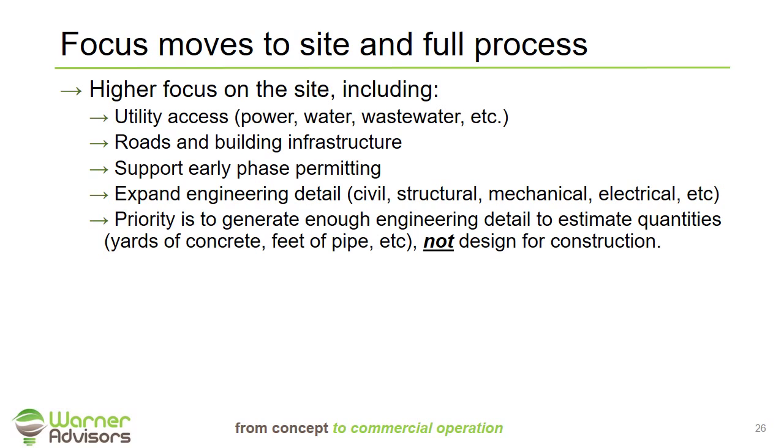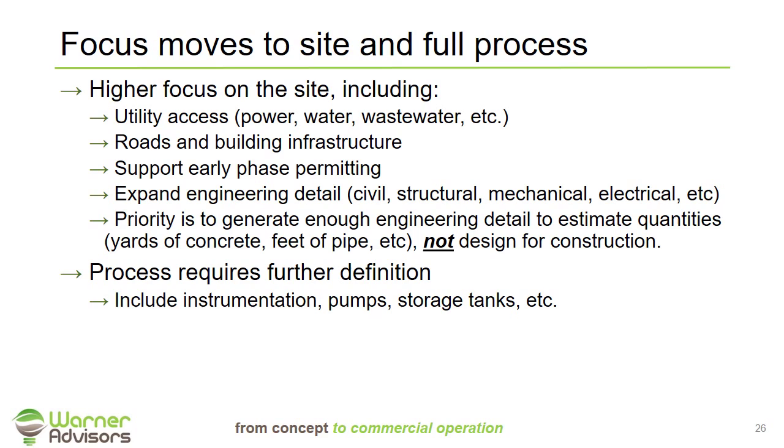The drawings generated will not be able to be used for construction, and there will be a much more detailed phase of engineering that comes in the next scope of the project. Now, we're also going to have to look at the process and get a little better definition. This includes things like instrumentation, pumps, storage tanks.